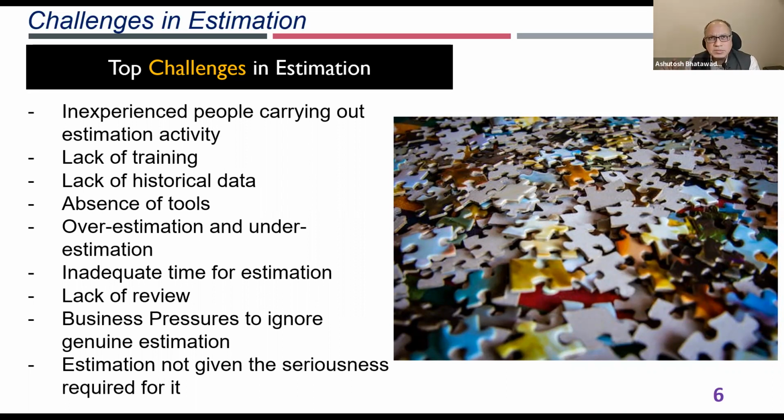See, reducing estimation and reducing price are two different things. Unfortunately, we try to correlate them. We have to de-link both of them. Just because you have reduced the price doesn't mean that we'll be able to deliver in less time, right? The effort required is still going to be the same. So you might want to give a discount to the customer. That is totally agreeable, and I'm not denying that you might have to give some discounts. You might have to give some leeway to the customer or some free things with this. But that should not impact our estimate. Your estimate still remains the same. So that is another important thing.